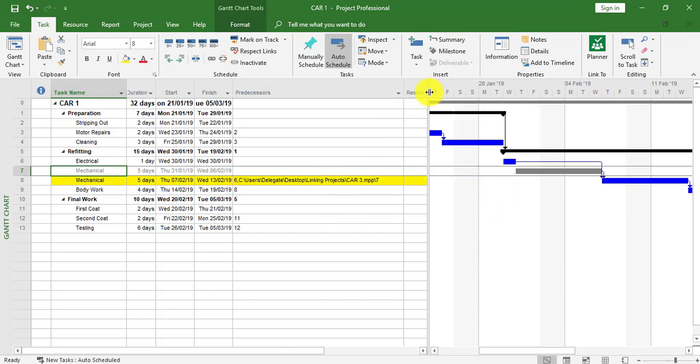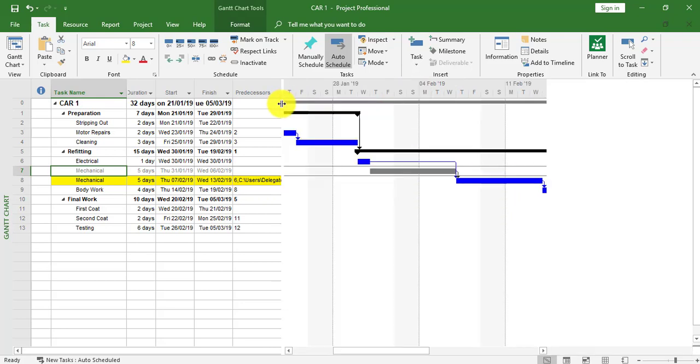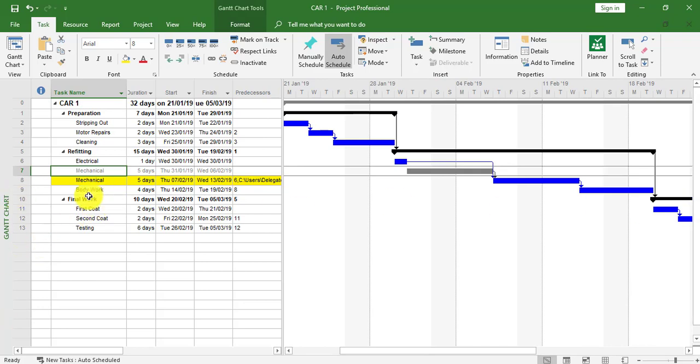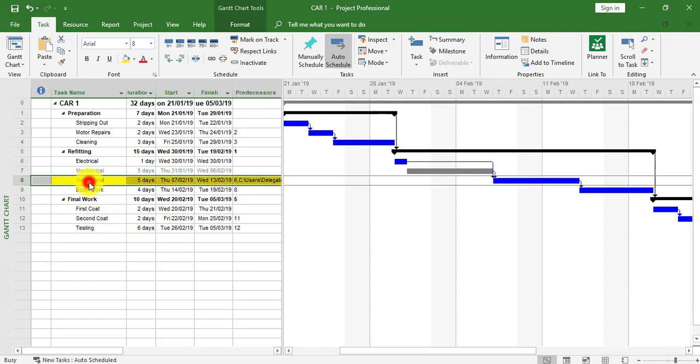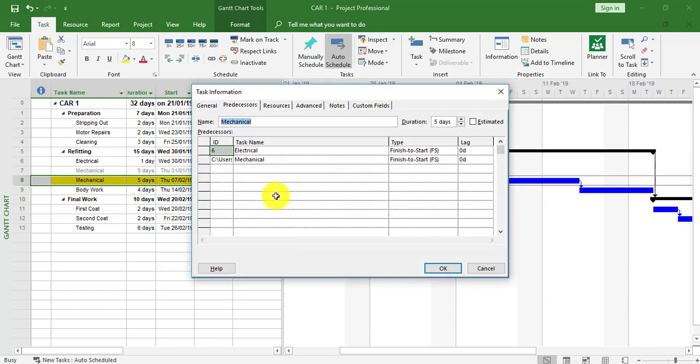I'm going to double-click the mechanical task within Car 1 and change it to a Start to Start.